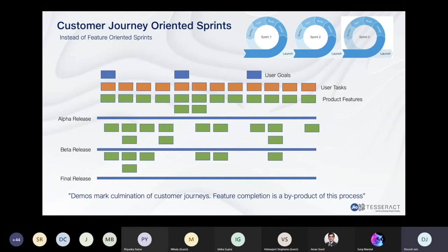But I wanted to highlight that in general, development in Agile methodology happens through a manner of sprints, and these sprints are either weekly, bi-weekly, or even fortnightly efforts, wherein the entire team, the development team, the design team, the project managers, the scrum masters, or even the QA folks, are all part of defining or achieving a certain goal.